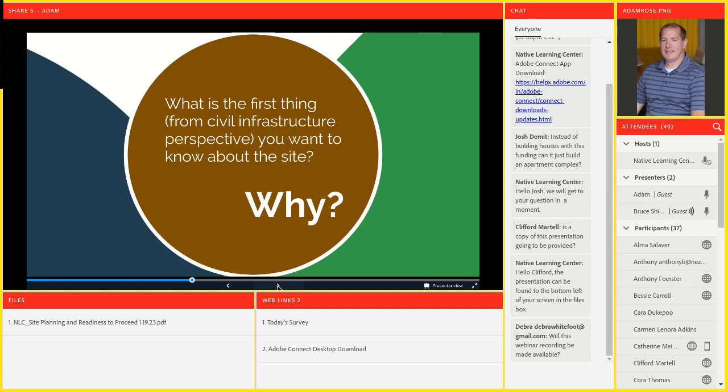And we're now at a point where the project has been out to bid and had to be rebid because, as Adam mentioned, costs in coastal California are extremely high, and a lot of value engineering had to be done after the first set of bids came in, millions of dollars higher than were anticipated.